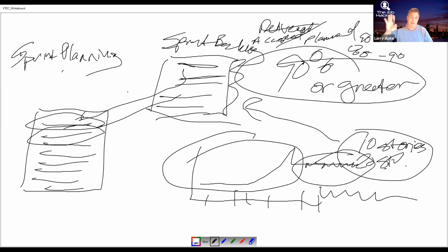I tell them I'll do headstands in the corner if you can give me 90% or greater of what you planned every sprint, right? And you can't cheat. This is without overtime and stuff, right? Because the goal is not to work people to death. The goal is to get value through the system. And honestly, I've had managers say that they think they're getting more out of their people because their people are working longer hours. It's not true. We'll talk about it a little bit later, you're just creating more technical debt for the future. That's all you're doing.